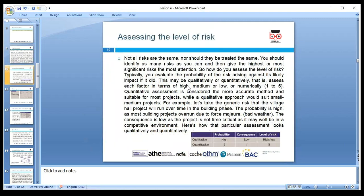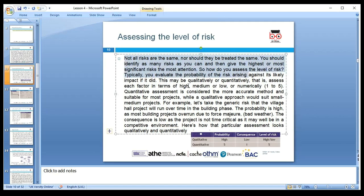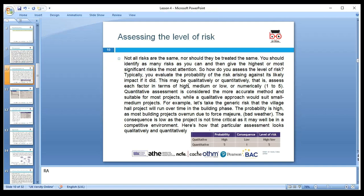A good starting point is the milestone of the project. According to planners, the six sources of project risk in engineering and construction projects are: changes in scope and acquisition, performance design errors or omissions, inadequately defined roles and responsibilities, inaccurate costs — where actual costs can be higher — and technology and performance issues related to time, cost, and quality. You have to put your milestone plan in place to help minimize the risk. Then you assess the risk level using the RAG approach: Red, Amber, and Green. Red is high risk, green is low risk. Risk can be quantified — qualified as high, low, or medium — and you can assign numbers, helping you identify, address, and minimize the risk.